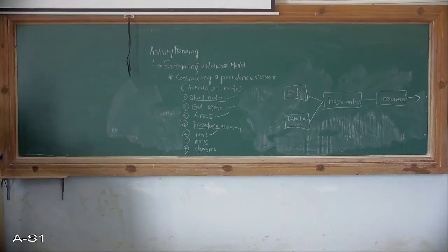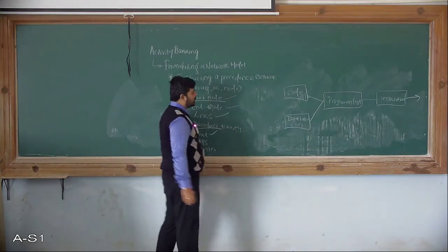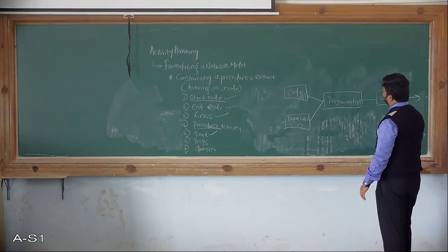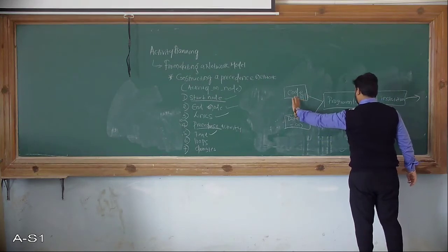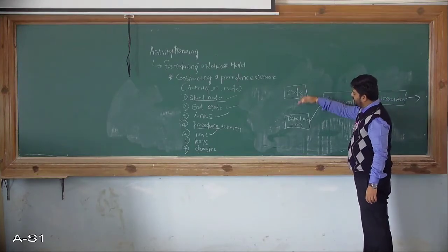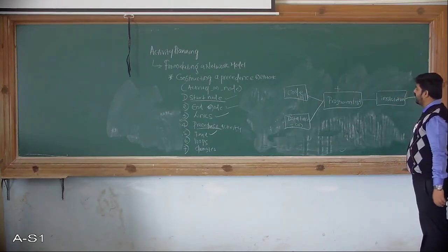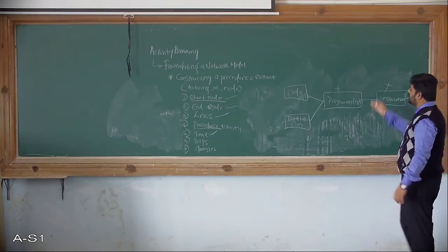So here you can observe the working procedure. So what is this precedence network? Here you can observe the different activities involved in that. So code and the data take on, these two give inputs to the program test, fine. Without code and without data you cannot proceed with the program test, and without the program test you cannot go with the installation. So this is the precedence network.